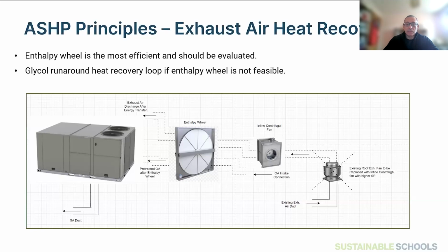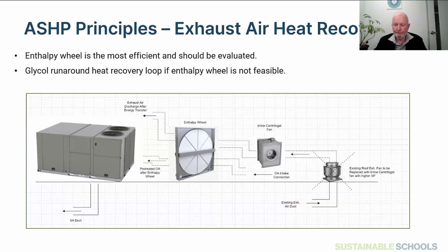Also, Chester-Lee is typical of about 35 schools, all built within the same time frame. So they're all similar, same mechanical systems. So we thought, well, this is a great opportunity to try a hybrid air source heat pump system, work it through its paces, let's say, and then make a business case that we want to do all the remaining 35 schools in this way. So that's the process that we took.